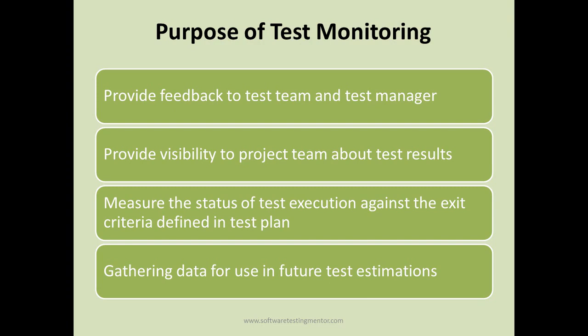So the estimation was not proper in this release. You were able to do the execution well in advance compared to the estimated time. So this data, that you were able to finish the testing 10-12 days in advance, can be used in future test estimations of further test cycles.